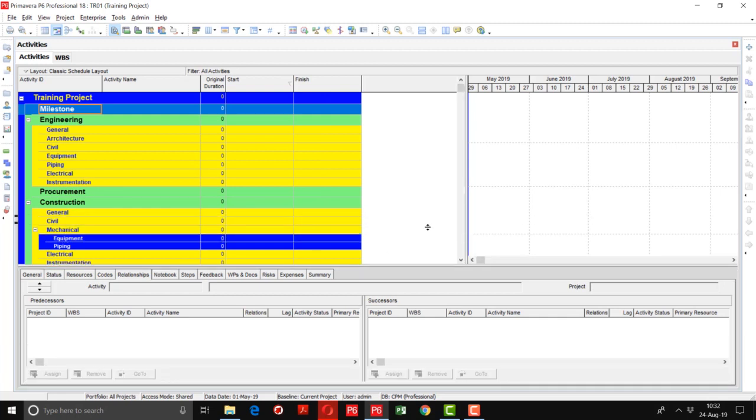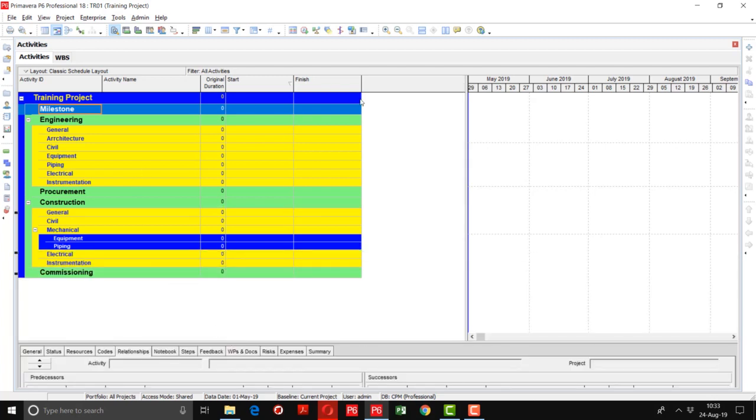The other thing is that you have created this project WBS on the basis of experience, on the basis of the requirement, on the basis of the management decision. This WBS is based on the layout drawing, in which you can divide the area into sub areas. Different methods can be used to prepare the WBS, but the technique used to create the WBS is decomposition, and everything included in this WBS is considered in the scope. If anything is missed here, you can consider this out of the scope.